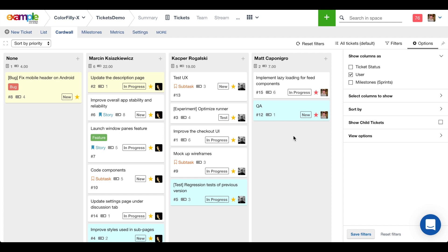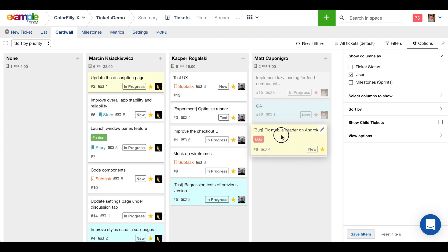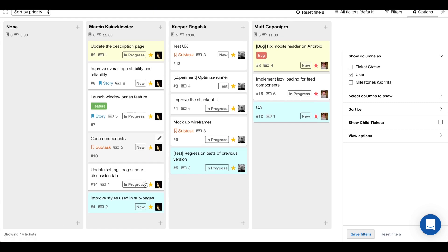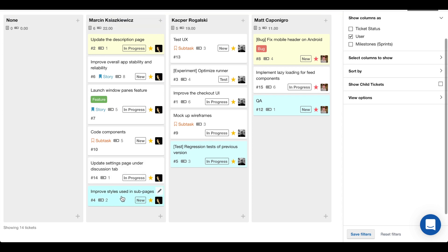I'm looking here and it looks like Marcin and Casper have a lot on their plates and not a lot has been assigned to me. So right off the bat, let's take this bug that needs to be fixed and assign it to me. Marcin still has a lot on his plate too. I might be able to take something off of Marcin's plate.